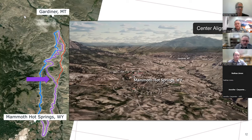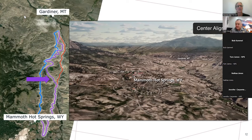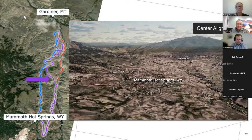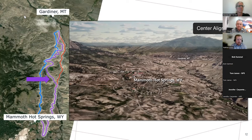Nicole: The next question is for Nate: Is the current temporary road above the landslide areas? Nate: Short answer is no — the current road is actually within the landslide areas. Part of the analysis Cam mentioned involves geotechnical work going into any of these alternatives. Right now we're working on characterizing these landslides — installing instrumentation, looking at satellite imaging, doing InSAR analysis — trying to get a sense of which areas are the most quickly moving, which areas seem to be more historic and less active, and trying to avoid the areas that are the most active and have shown the most recent movement.